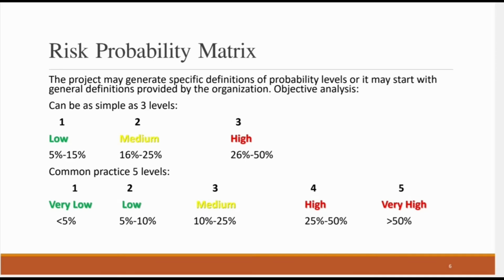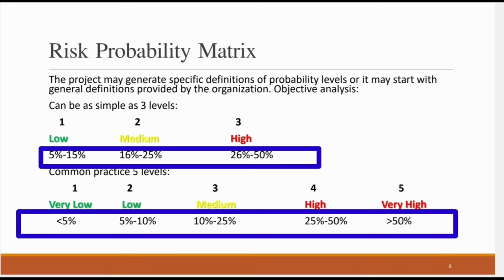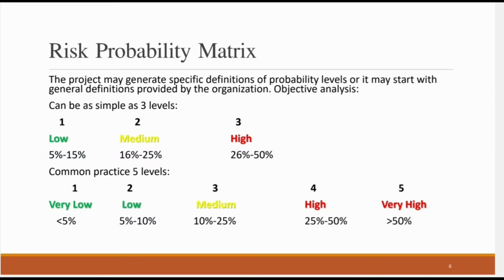And that's why I told you that the 5 parameters probability matrix is more realistic, because now I can identify between the risks that have an even chance to happen and the risks that have more than 50% to happen in my project. So I turn the subjective words, which is the low, moderate, high, very high, medium, and so on, into figures of a probability in order to be able to use them in the quantitative risk analysis, which is science, and it is more objective.